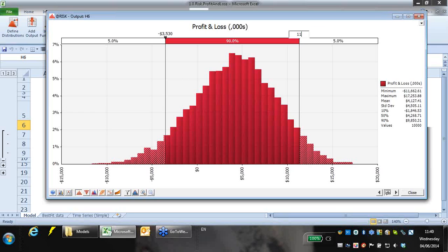Our original forecast, before we had any uncertainty or any probability distributions in there, was 11,916, I'm pretty sure. A figure which we've got a 3.5% chance of achieving or bettering once we put in our probability distributions and run a simulation. So all of a sudden that particular venture isn't looking quite as rosy or guaranteed as it was when we were viewing things through a deterministic filter. Once we start putting some uncertainty in here, all of a sudden this venture looks decidedly less appealing.